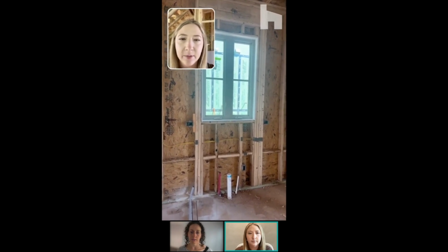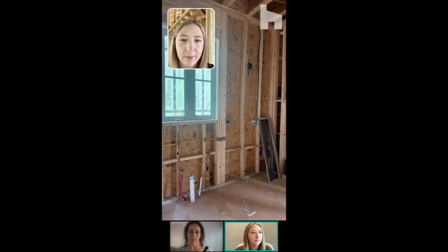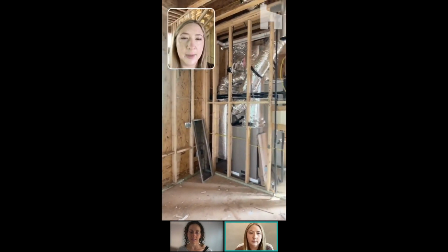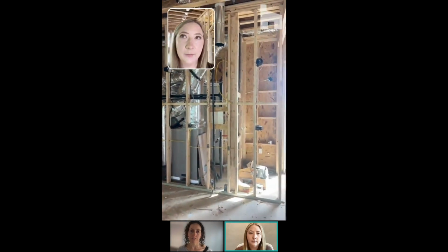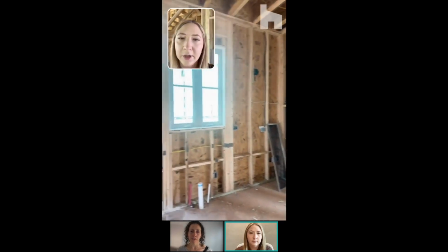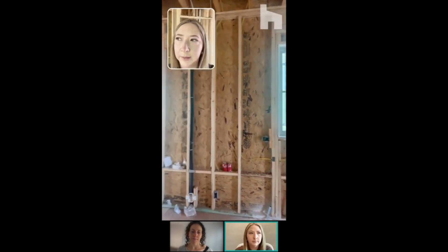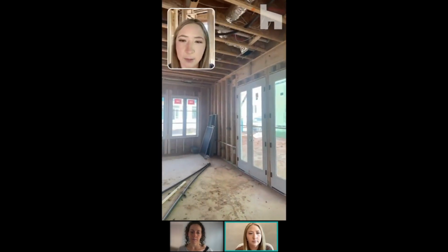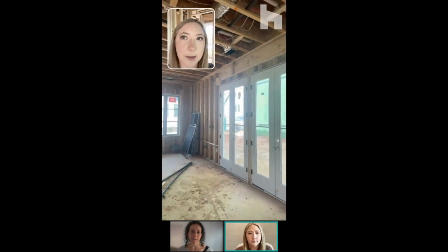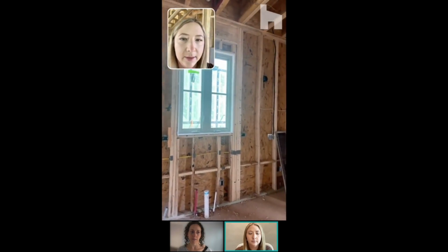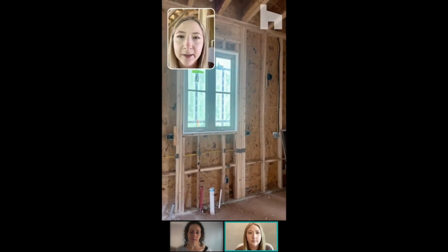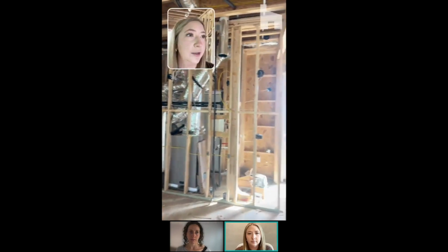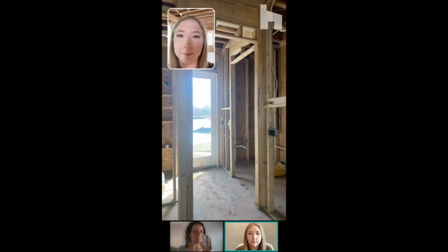Hi, Mr. and Mrs. Robles. Just wanted to update you that we have electrical and mechanical and plumbing roughs all completed. We just put the windows in this week, which is really, really exciting. You can see all the windows are in place. And next we will be moving on to insulation, and we're also going to be working on the siding outside simultaneously. So feel free to pop by for a check-in soon. Things are really moving along.